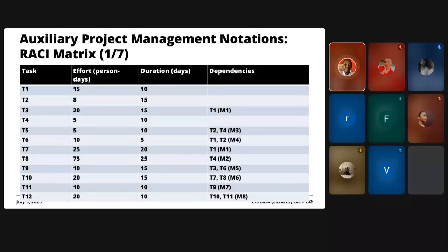So this brings us to this discussion of what I consider an important, mandatory actually, project management artifact that allows you to assign roles and responsibilities to project team members. It's called the RACI matrix, right? RACI really is just an acronym for responsible, accountable, consulted or communicated, and informed. So you assign these different roles to the project team members. And it turns out that the input to this project management artifact is, again, your breakdown structure.